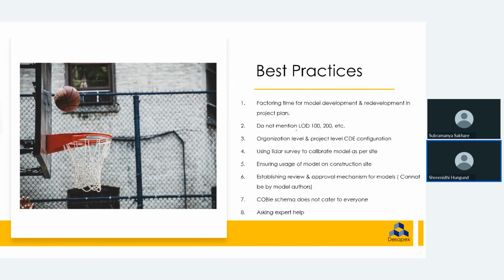Then organization level and project level CDE configuration. I think by this time people have understood what a CDE is and the importance of that. If you want to know more about it, we have done a specific webinar only on CDE, on how to configure it at a process level and at a project level, without specifying any specific technology. A vendor neutral approach has been taken there. And then using lidar survey to calibrate the model and site. There is always a catch-up between the construction site and the model, so you use drone or terrestrial laser scanning to bring the site data back to the model or the model data to the site.